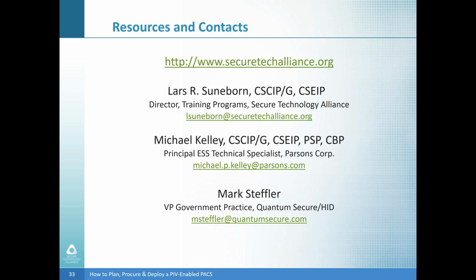And it also states that the CSCIP certification, Certified Installation and Service Provider, is a prerequisite to even submit a bid and propose to those contracts. So contract vehicles, both Schedule 70, idmanagement.gov, and Schedule 84, gsa.gov.